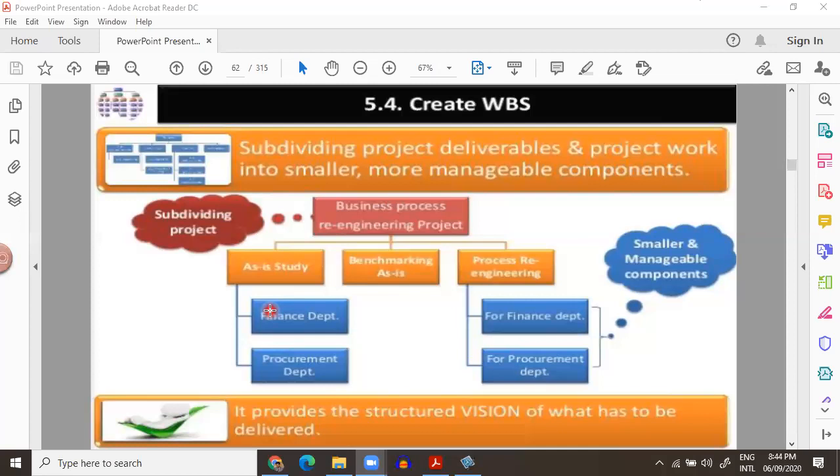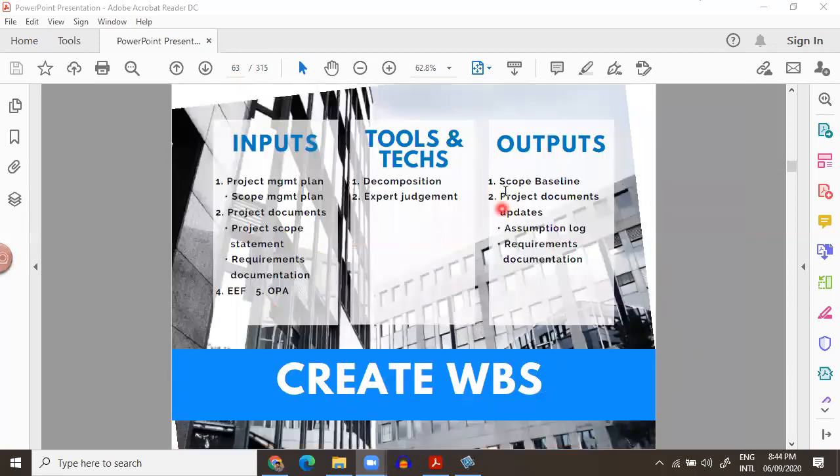Work packages are useless to understand without the work breakdown structure dictionary. We have the work breakdown structure dictionary, and we combine the project scope statement, work breakdown structure and the dictionary, and we call it the scope baseline. So here we have one important baseline in our hand, called the scope baseline.